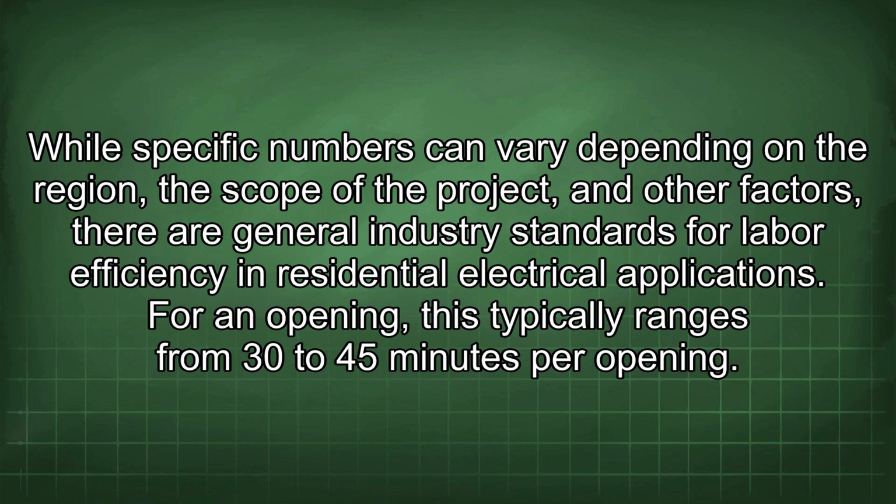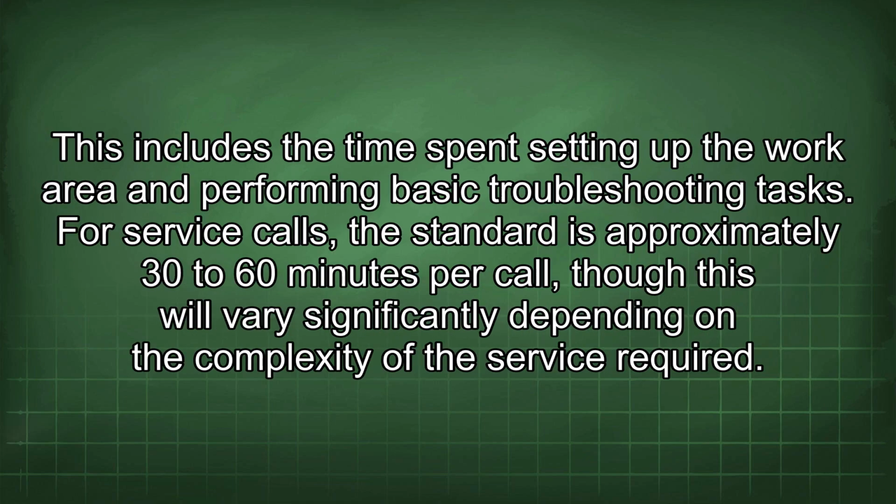For an opening, this typically ranges from 30 to 45 minutes per opening. This includes the time spent setting up the work area and performing basic troubleshooting tasks. For service calls, the standard is approximately 30 to 60 minutes per call, though this will vary significantly depending on the complexity of the service required.